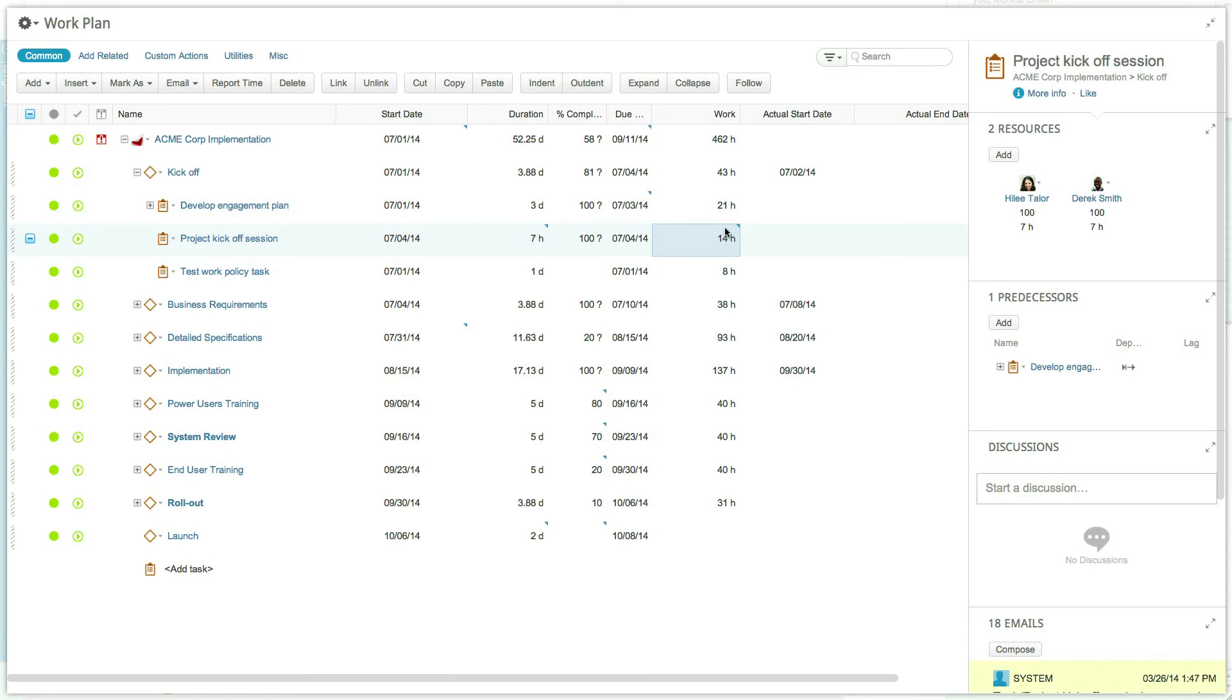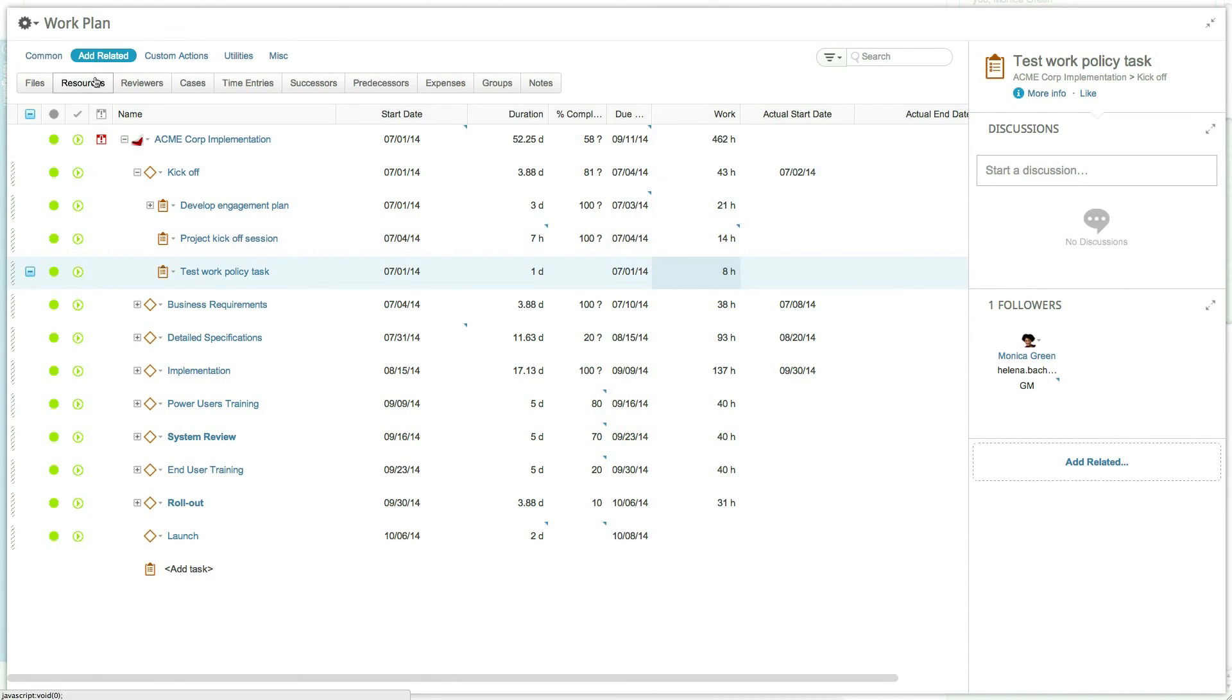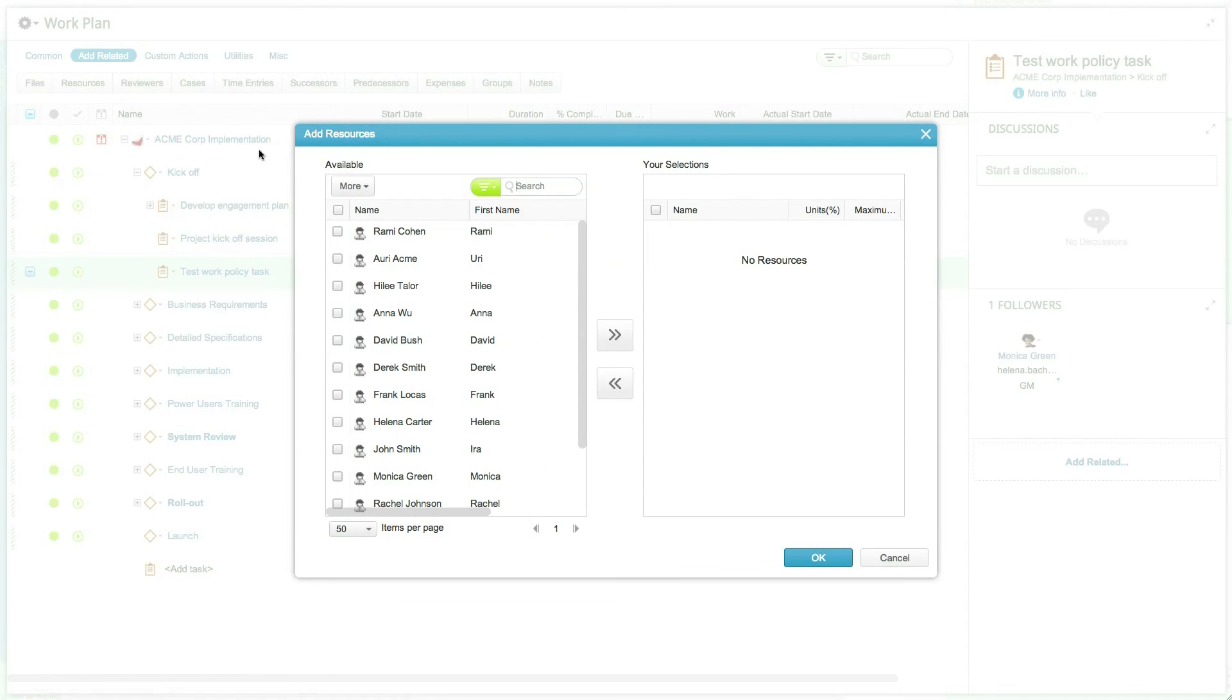In tasks where no resource has been assigned, the manager is considered the sole resource and therefore the unit is the manager's availability, even if it is not visible on screen.